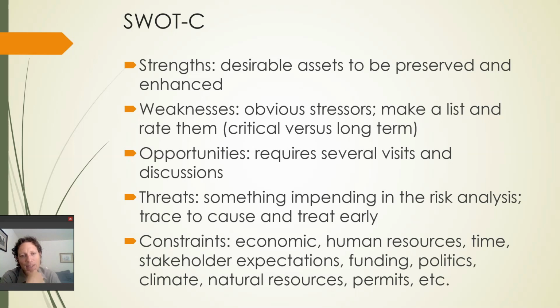In that case, you want to make sure you deal with threats in that first phase. So take your stressor that is the highest risk of derailing the project altogether and address that in the early implementation. And maybe it's something that can even be addressed before you go to grant funders and ask for money to keep the project going.